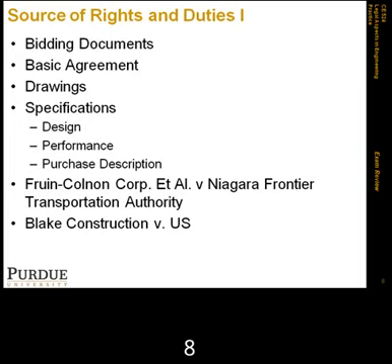So Blake started putting conduits underground. The Navy said no, you still need to put them overhead. Blake complied, and then made a claim for a constructive change order. The Federal Court of Claims agreed with Blake, but the Navy appealed.